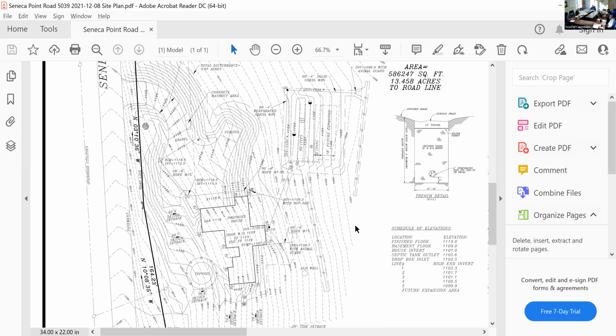Okay, I thought we had. I'll talk to him about that. I see the note, but where? Okay, I was looking at these. Yeah, he's at 60.1 and then 25. But the front setback is 60.1 and the closest is 60, so you have 0.1 foot to work with, and if you're over that, you're back to planning board and zoning board, back to more paper. Right. Just wanted to give you a heads up, because we've had that happen many times recently.